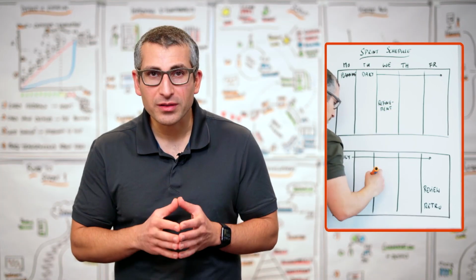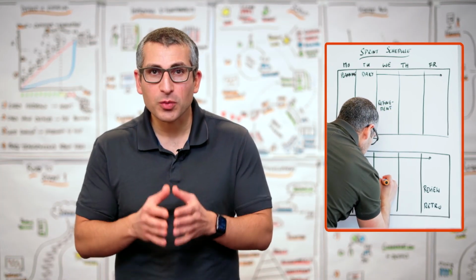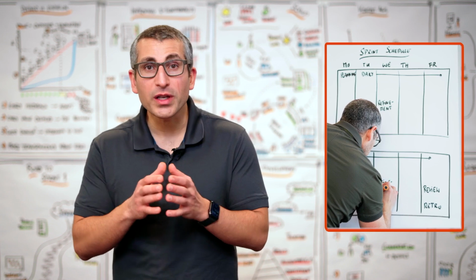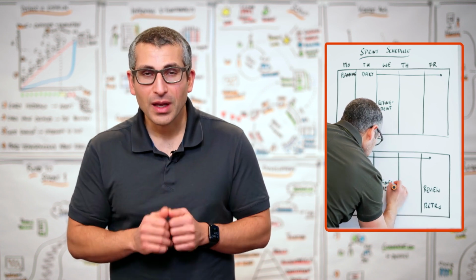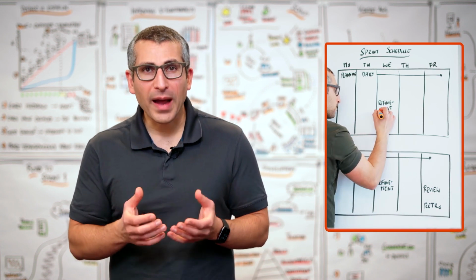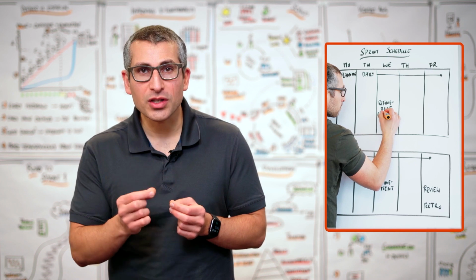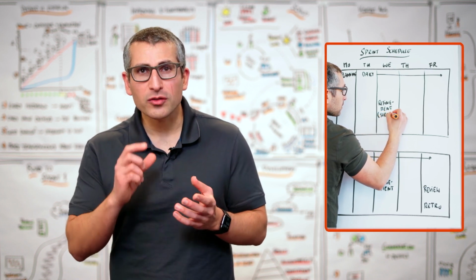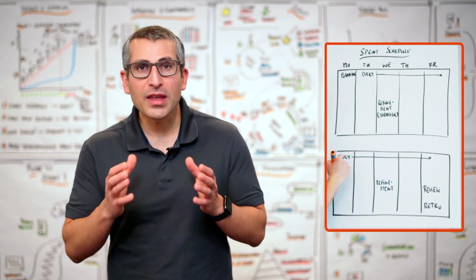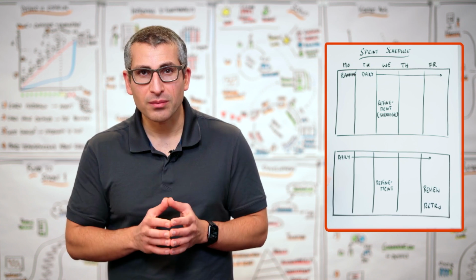In a 2-week sprint, the product backlog refinement between sprint week 1 and sprint week 2 is different. In our first week, the product backlog refinement is more strategic, which means we talk about the goals that we want to achieve and the appropriate prioritization.